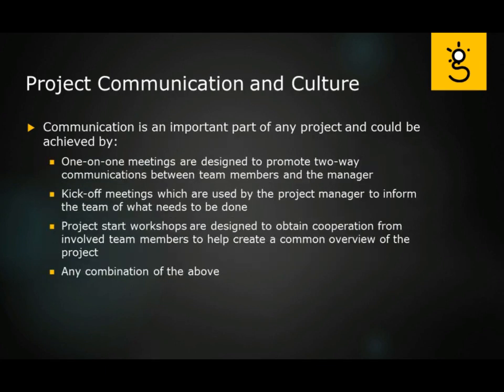One of the important things about a project we've talked about already was the communication and culture. Communication has got to be probably one of your most crucial parts of any project, because we have to communicate, especially depending on the complexity. You might do so with one-on-one meetings designed to help promote two-way communications between the team members and the manager. You might consider a kickoff meeting, which a project manager can use to inform the team of what needs to be done. You might have some project start workshops designed to obtain cooperation from the involved team members to help create a common overview of the project, or any combination of the above.